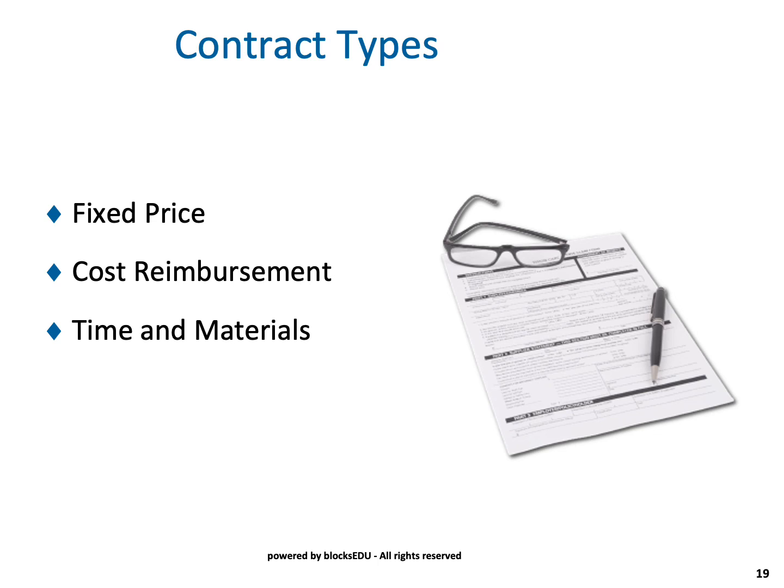The last thing I want to briefly touch on is contract types. Now, I don't want you to become a lawyer. You don't need to be a lawyer to understand contract types, but as a project manager, you need to have some sort of idea of the type of contracts you can actually create with vendors out there to provide services for you. One is fixed price, and it simply is for X amount of work, we're going to pay you Y number of dollars. Very simple, very efficient, very good for both parties, as long as the statement of work, the why they're going to pay that organization, is clearly defined.